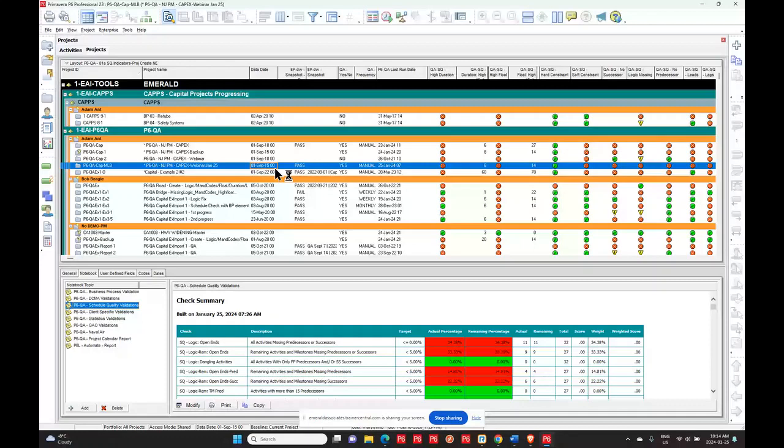But does it stop once your schedule is built? Not in my world, it doesn't. I forgot to mention to you, I've done the scheduling piece for a number of years. So this particular tool, as Nicole mentioned, running while you're doing your updates can be very helpful as well, because you get updates. Maybe people are putting the updates in your schedule. Maybe they're being routed to via an import. But once the updates are done, if there is open ends, if there is problems of different kinds, hard constraints have been introduced, things like that, and you go and schedule your project, it can really create a lot of work for you to go and basically fix it. So this will let you know what's going on.